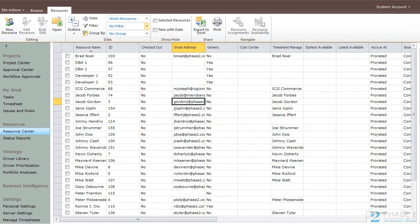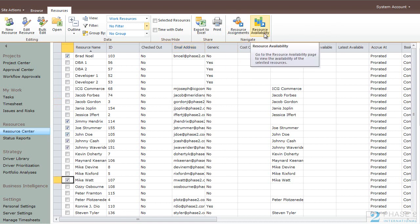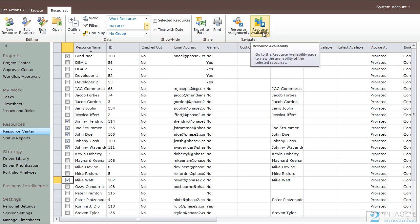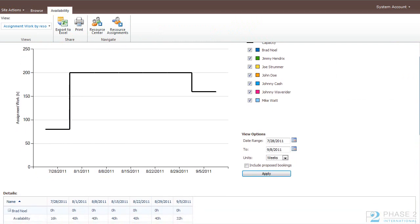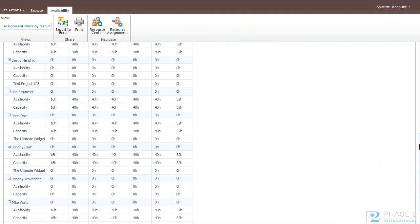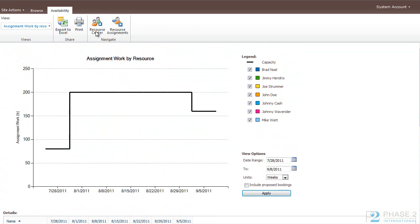In Project Web App 2010, the Resource Center comes with a couple of nice tools for project managers to manage their resources. Let's say we need to find some resources. We want to see where these resources are allocated. You simply select a few resources that you want to check on. First, we'll show you the Resource Availability button up in the ribbon under the Resource tab. So after you select a few resources, go ahead and click the Resource Availability button. And you'll see a graph showing you some information on the schedules of these users. You can change this on the fly here in this area as well.